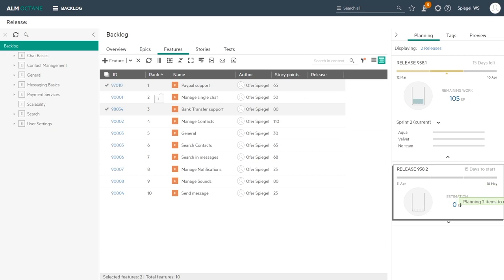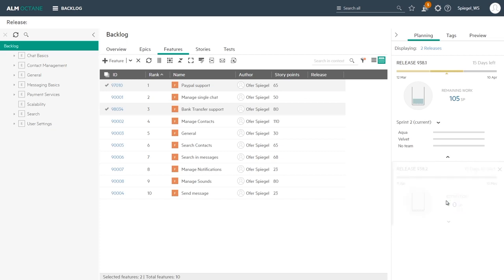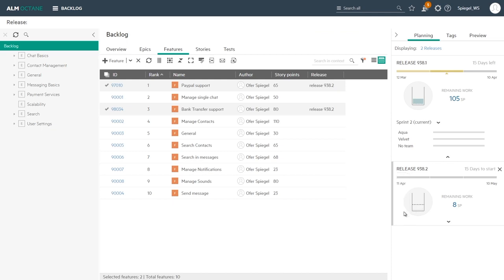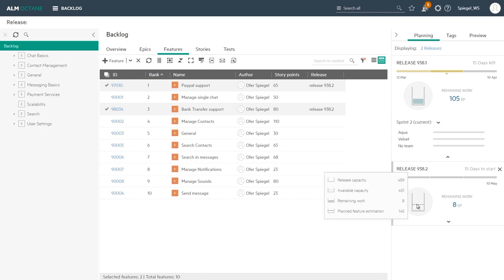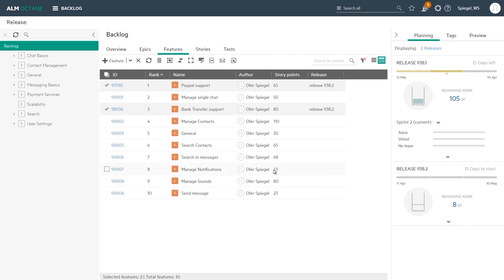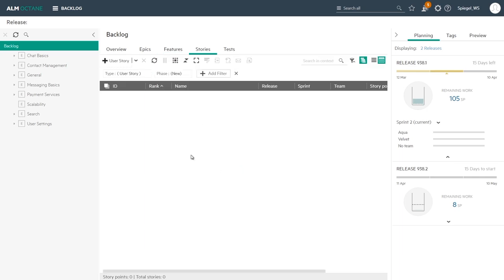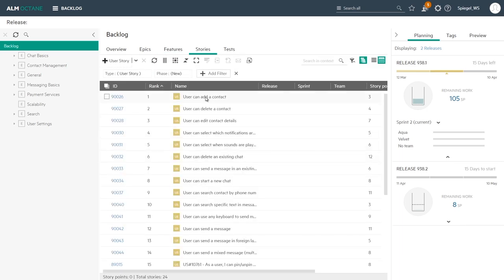By that I can prioritize and do that ranking work throughout my features. Then I can plan them and go to that release bucket on my right hand side and drop it on that release, and by that assign those features to that release. I can see against the release cap velocity based on all the teams allocated to that release with their velocities for each sprint. So I can measure how much I'm estimating - that dotted line is the estimation against the release velocity.